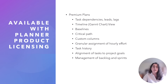The ability to create premium plans is available to those with additional Planner product licensing, like Planner and Project Plan 3. Premium plans include task dependencies, a timeline view with Gantt chart, custom columns for unique project metadata, granular assignment of hourly effort, alignment of tasks to project goals, pre-built sprint setup with backlog, and the integration of task conversations with team channel posts. Microsoft is rolling out premium plans with the project manager agent, which leverages AI to accelerate project scheduling and the surfacing of project statistics.